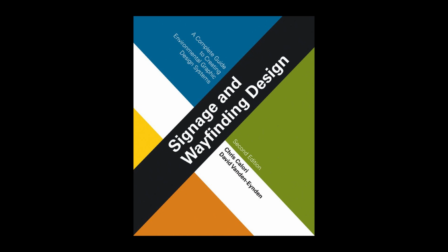Therefore, formal design presentations are rare during the documentation phase. Designer-client interaction during Phase 4 is usually more in the form of coordination meetings and document review to resolve all the details of the program, culminating in the client's approval to release the design documents for the bidding phase. Coordination between the designer and the client's contracting representative should also occur during Phase 4 to prepare for the bidding phase.